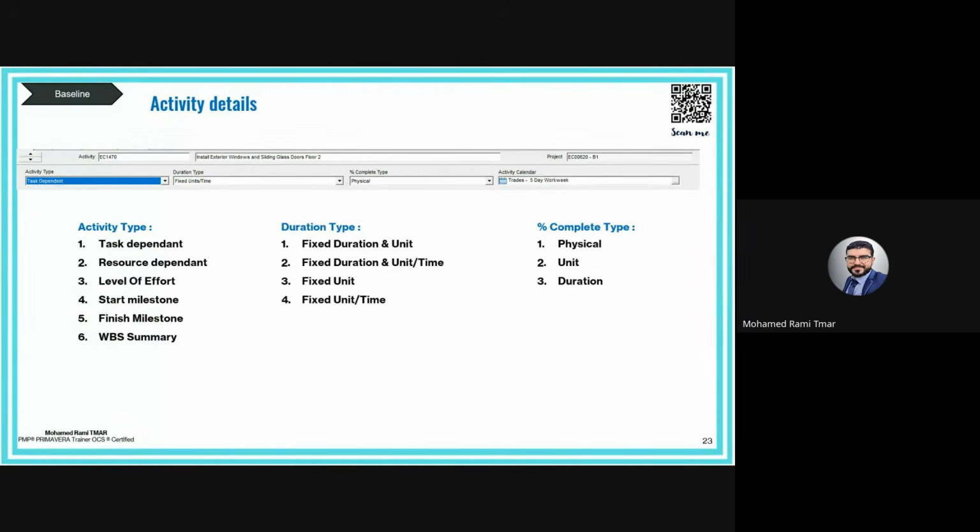And then the productivity ratio will be calculated by the software based on the estimation. But in reality, of course, how do we calculate the duration? The duration is calculated based on the quantities and the productivity ratio. So it's a loop.